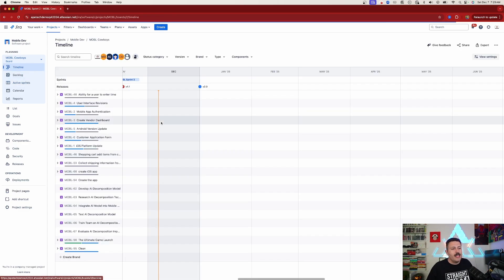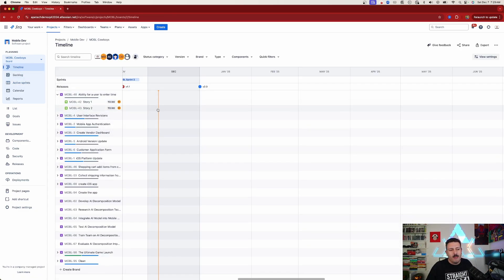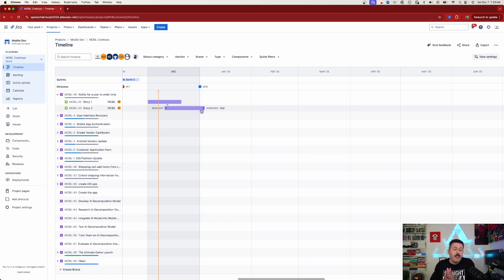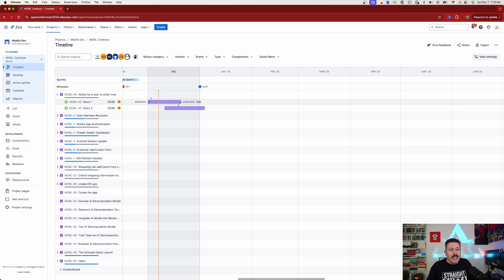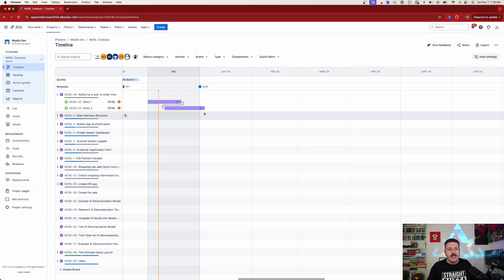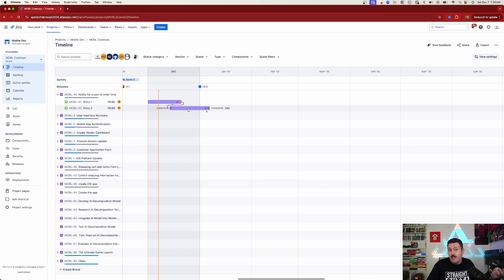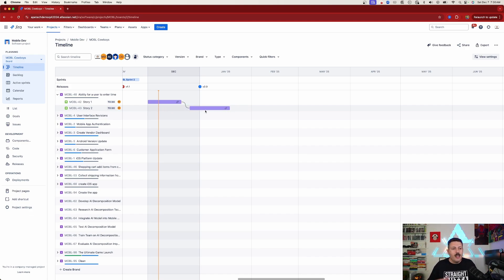Once you go back to your timeline, you can put dates on pretty much any issue you want — just drag and drop to define your start and due date. You can also connect things: hover over issues and you'll see little bubbles pop up. Click one and drag it to the next to create a dependency. If it's red, that means the end date of the previous task is after the start date of the dependency, so adjust accordingly. You can essentially build out your entire roadmap this way.